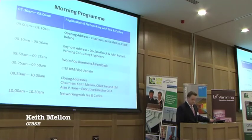My experience in the commercial and industrial sector has taught me that BIM can be used on all projects in some form or fashion, but it is not necessary to model the complete installation of a project in order to achieve success. The focus on clash detection to minimise construction costs can encourage parties to overuse BIM in areas where it is not required. Specific areas that would require 3D modelling would be highly congested zones such as service risers, ceiling voids and plant rooms.